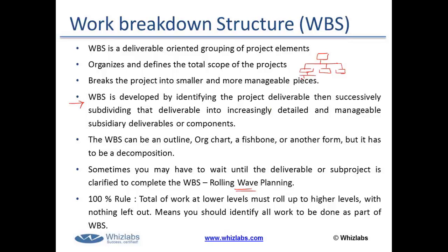Right? So we would create a WBS only up to the Windows 7 installation part, and then once we have created a test environment, once the scope is clear up to that point, then we would come up with the remaining part of the WBS. We are not saying that you will do a halfway planning and start the work.